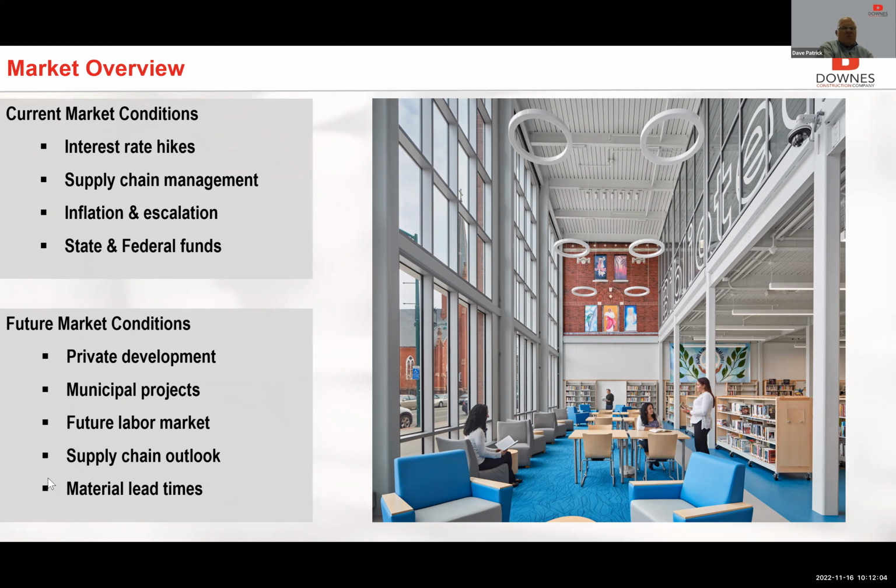Supply chain. So really what happened was we had an abundance of construction projects. We had a limited supply of materials, and what we saw was inflation and escalation to the cost of construction. And I can tell you that in our world, because we're involved in projects that are in various phases, those changes happened so quickly that it was very difficult for certainly the distributors and the subcontractors to keep track of what the cost was. And so we'll talk a little bit more about that.